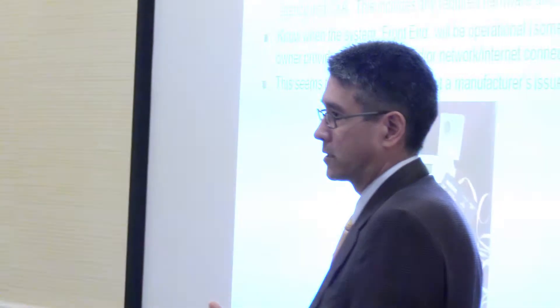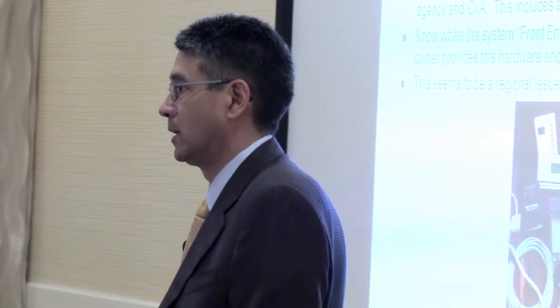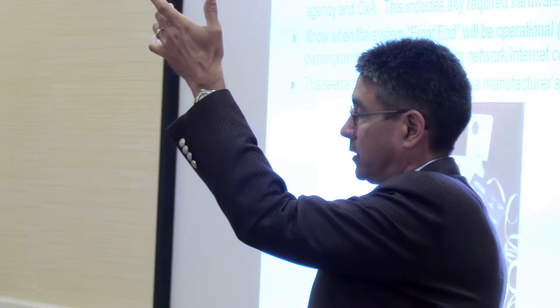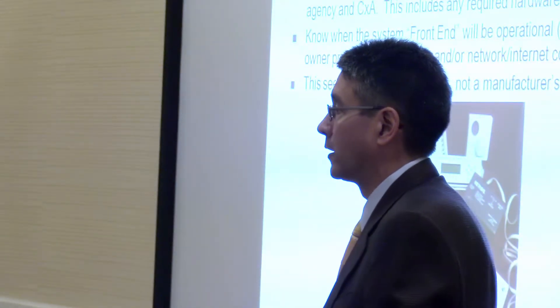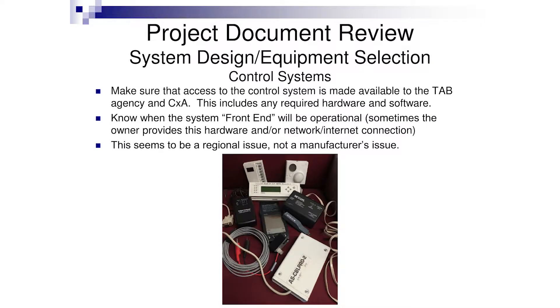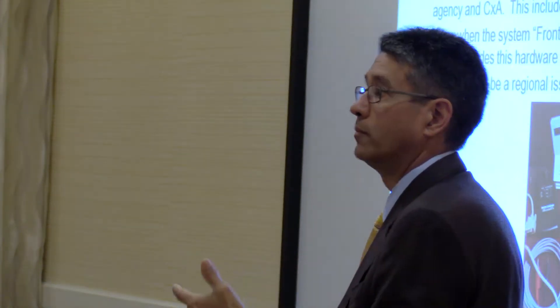Make sure all the proper interfaces are available — user-friendly for the owner, but also for the commissioning agent and the TAB technician. So many controls systems are going web-based, app-based, and some are going wireless, which means you may not need to climb a ladder and plug a cable into a box. Bring the conversation up early on a project: who's providing the front-end and who's providing the internet connection, and when will it be live? Sometimes you need that availability when you're commissioning or balancing.